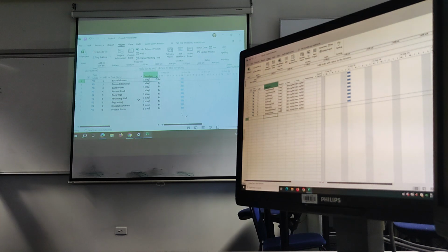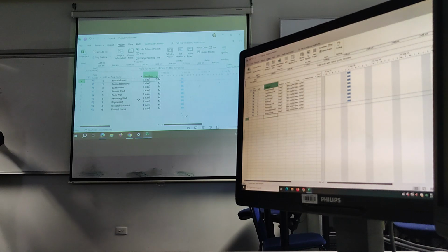So the productivity rate is 80 meters squared per hour. Therefore, the duration equals 6,000 meters squared. And I can do this in my head, but I'm still writing it down. Meters squared per hour, and I'm putting units in.